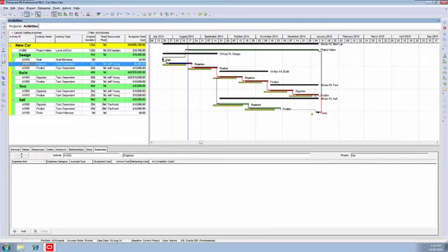And this delay on the final activity in the critical path, the red path through here, means our finish milestone has moved away from the original planned finish date. So we've slipped 5 days all the way down through the critical path. If we look at our float, we can see we've still got 9 days positive. So we're not yet beyond our project must finish by date, but we are slipping. So that should be a cause for concern.